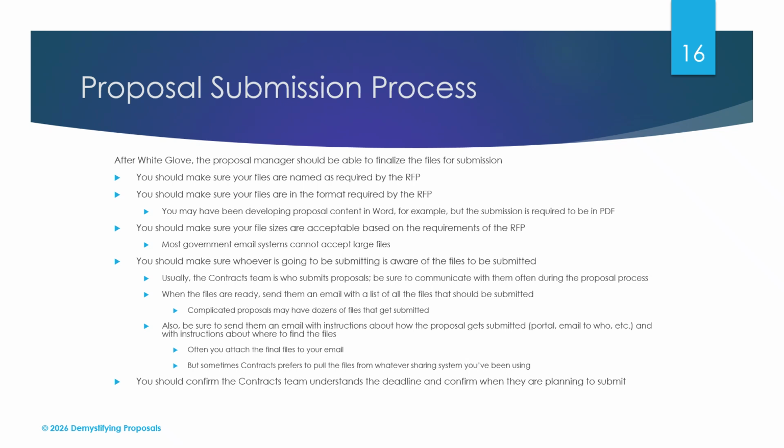They hopefully know this information, but it's always good to confirm with an email because obviously a bad submission means your proposal doesn't get evaluated. So often you attach the files to the email that you send, but sometimes contracts prefers to pull the documents from whatever sharing servers you're currently using. Finally, you should confirm the contracts team understands the deadlines for submission and confirm when they are planning to submit.